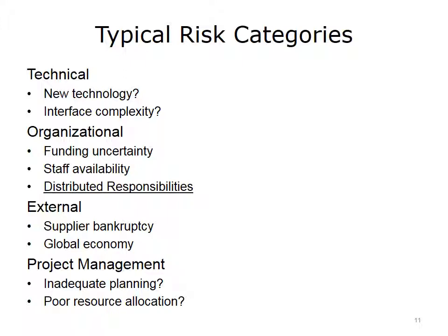Other typical categories for risks include organizational risk. For example, how stable is your funding? Are you dependent on later infusions of money, or do you have all the funding up front? Large or complex projects often do not have all the funding established at the beginning, so you may need to consider backup plans if the money can run out.